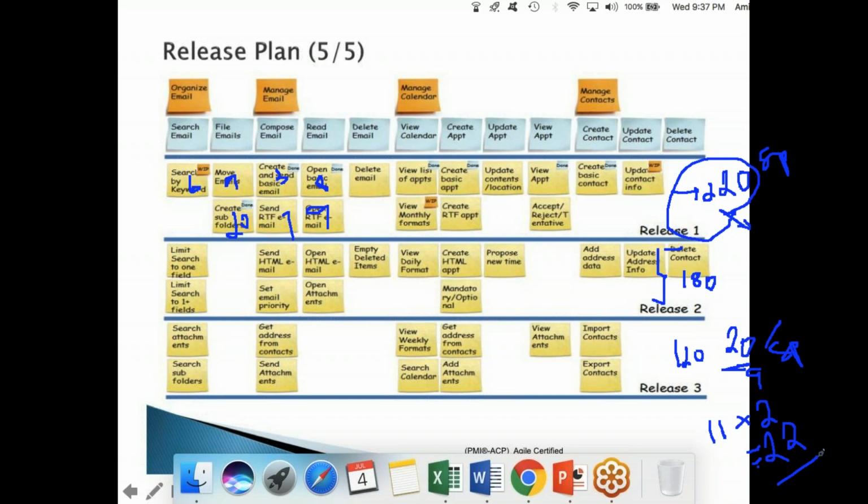So you may have a question, what if the team is convening for the first time? We don't know their previous velocity or capability. First time we are all working together. They do pilot sprints. 3 pilot sprints they do, sample sprints. Sample means it's not dummy work, it's real work. They will see the average velocity. In 3 iterations, how many story points you are able to deliver as a team, they take that as a benchmark and they do the further estimations.